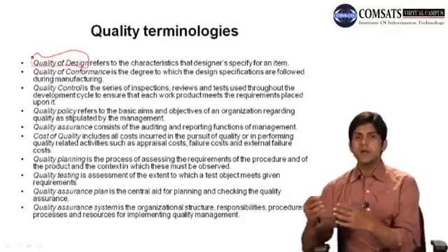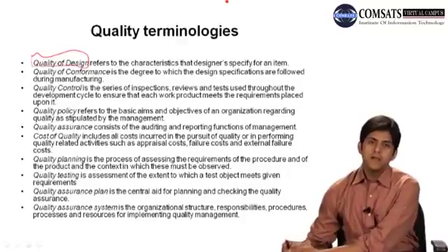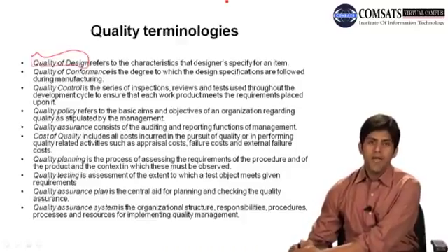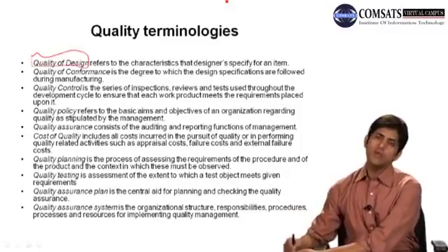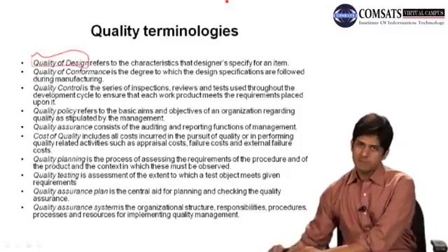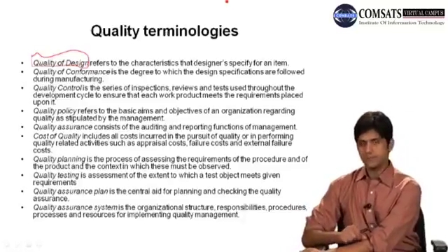So whenever a manager, क्योंकि अब जब हम प्लान करते हैं, उस प्लान के अंदर हम लिख देते हैं कि जी हमने इतनी डेट को रिव्यूज करने हैं, and the planned reviews we call formal reviews, and you can also conduct informal reviews. Then you can have audits. ठीक है, so everything is planned and written when you make this quality assurance plan.